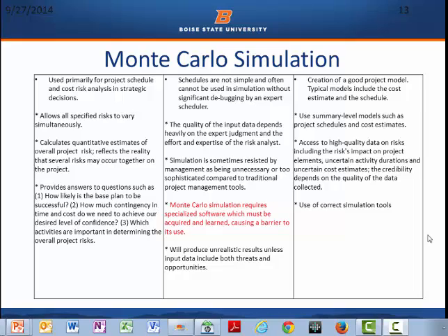A popular one in many texts is the use of Monte Carlo simulation. As we've talked about, this is a good tool, but it does have some very strong needs: quality data, understanding. In many cases, it's very expensive. It requires special teams to come in and use it, and your time for the data can be very long. So Monte Carlo simulation is good if you have the time, the investment, and your stakeholders need that high quality data.